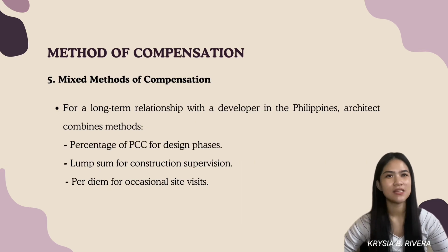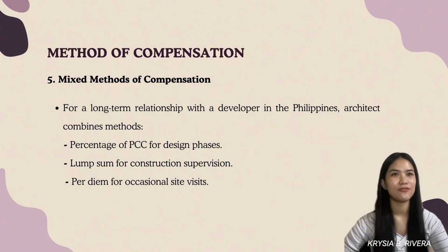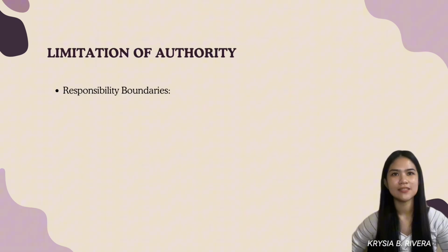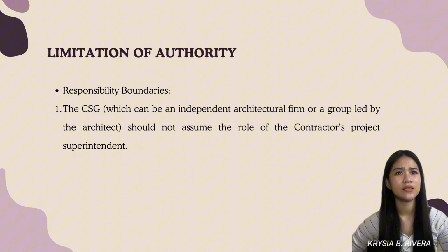Next is the mixed methods of compensation. For a long-term relationship with a developer in the Philippines, the architect, let's say Ave, combines methods. First is the percentage of PCC for design phases, then lump sum for construction supervision, and then the per diem for occasional site visits.